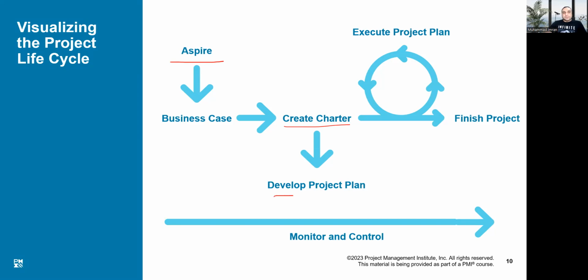And once we prepare the plan, it has to be approved again by the sponsor. Once approved, we will execute it. And while executing, we will monitor and control our performance for any variance, variations, rebaselining, changes, corrective actions, preventive actions, defect repair actions, or updating the baselines. All will be done in monitoring and controlling, and ultimately we'll be closing the project.